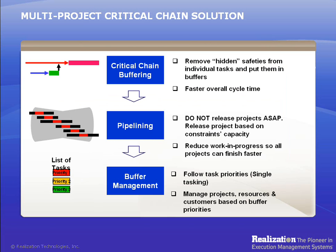The Critical Chain Solution is used in multi-project environments to reverse the delays caused by following traditional rules of project management and execution. In a multi-project environment, the Critical Chain Solution consists of three parts. First, projects are converted to Critical Chain Format where the longest resource-dependent path is identified. Task durations are cut for aggressive task estimates and buffers are added to protect the critical chain pipeline.